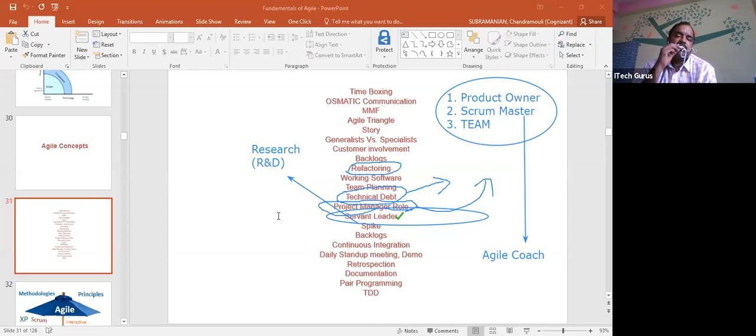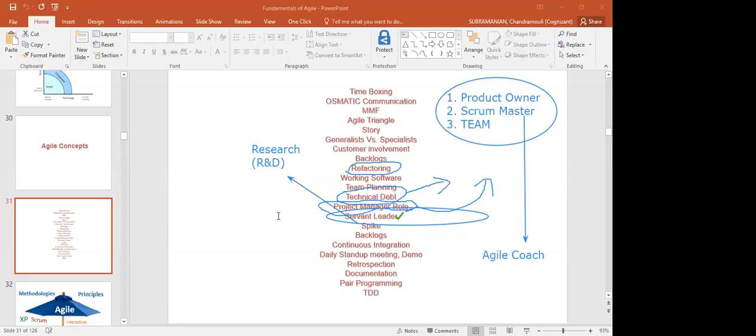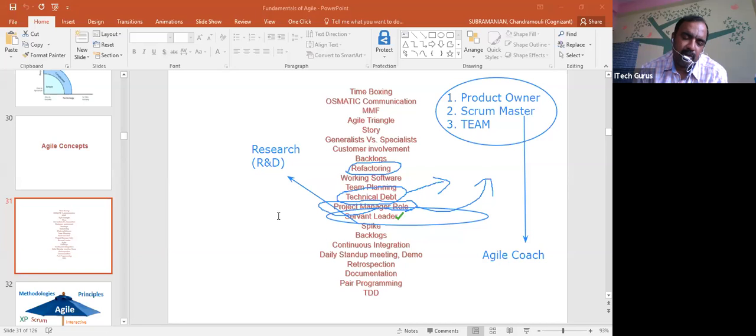That is why in an agile project we don't plan 8 hours per day. How many hours do we plan? Usually 5 to 6 hours. Why? Any guess why we are planning 5 to 6 hours for adding functionalities? Productive hours is only 6. Okay. Remaining hours for research.